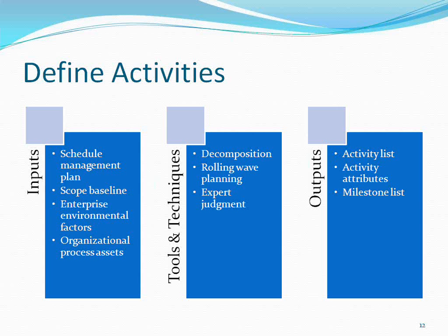Whatever work you are going to do in the near term is planned in detail, while the work in the future is planned at a higher level. For example, you are constructing a house. Let us go back to that example. The initial activity you are going to do is laying the foundation. So there is a deliverable work package called foundation. You will plan the foundation activity in detail.